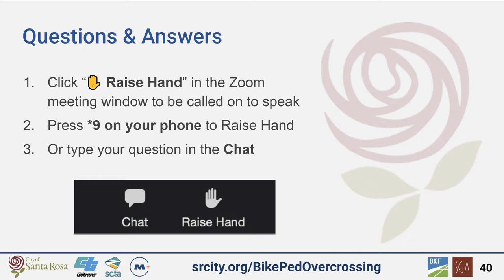Yes, Grant. Yes, we did. We've done an analysis of the utility conflicts during the environmental phase, and we are currently making contact with the utility companies who are in conflict, PG&E, AT&T, Comcast, and the city, and are making arrangements for the relocation and, in some cases, relocation of the overhead lines. Depending on their disposition, they may go underground in some locations. But to answer your question, yes, we have looked at the footprint against the overhead lines on Edwards and Elliott.